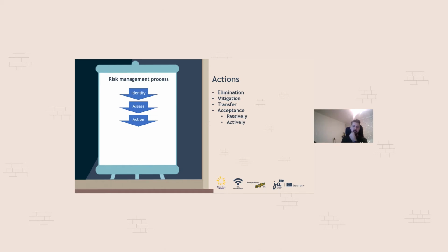Even this could be an insurance. For example, people in the project, something will get broken in the accommodation, a window or something, and I have an insurance that, okay, if something gets broken, then the insurance company will pay for me. So I'm not decreasing the probability. I'm just transferring it, or not transferring, but someone else will pay for it. So someone else is dealing with the money impact of the risk.